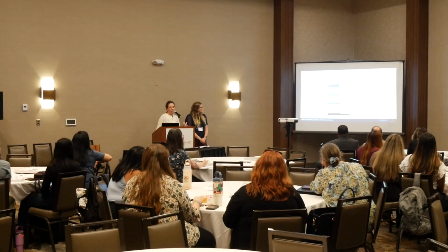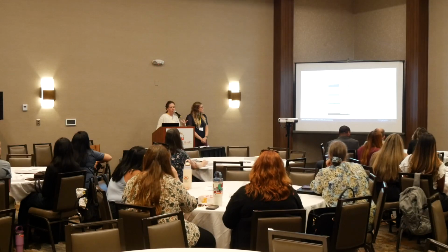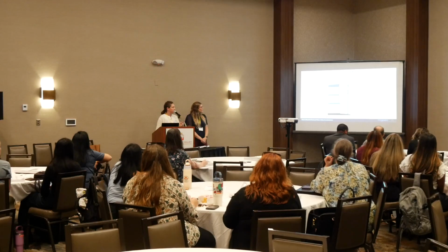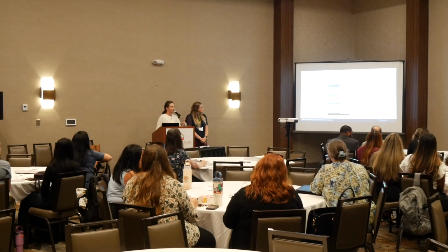And then at this stage, we're also doing things like maybe a little drawing to show some utility considerations. Like this project has power poles really close, so can we get the scaffolding in there when we're building it, or do we need to raise the pole or underground it or something?